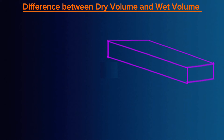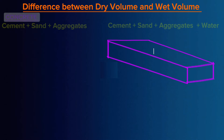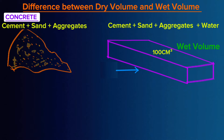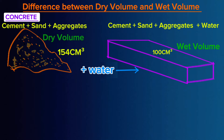For example, if we want to cast concrete for a slab of 100 cubic meters volume, the concrete we cast is wet volume. Therefore, what we mix before adding water should be 154 cubic meters, such that after adding water, we remain with only 100 cubic meters.